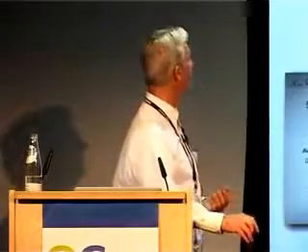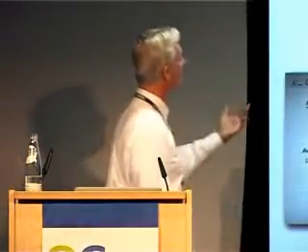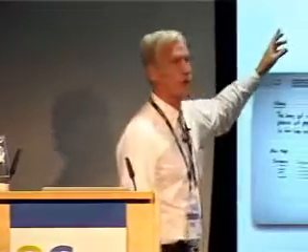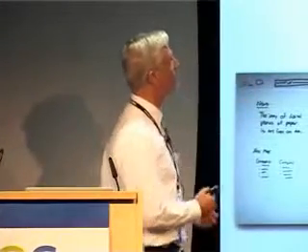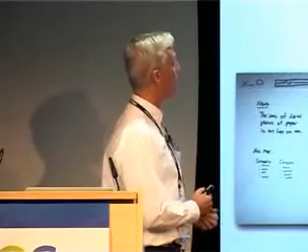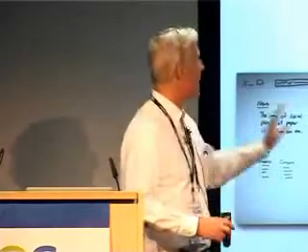A lot of the systems that we do involve a user interface, and we found it especially valuable for the onshore team, if there was an onshore team, to do relatively detailed UI prototypes with the onshore customer, doing various kinds of wireframes and so forth, to get some high fidelity feedback before passing those on to the offshore teams.